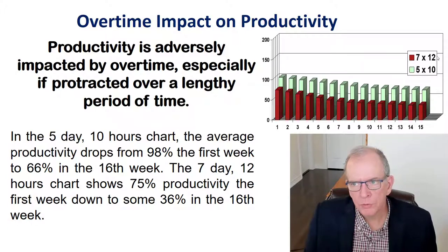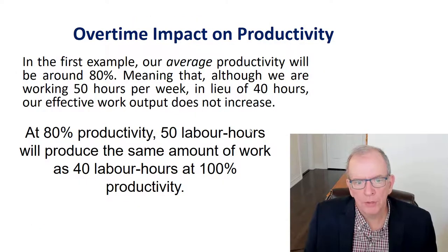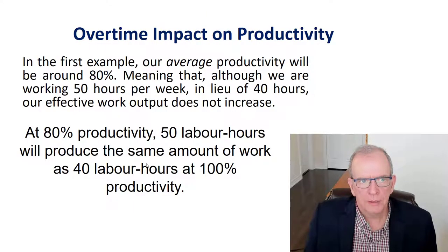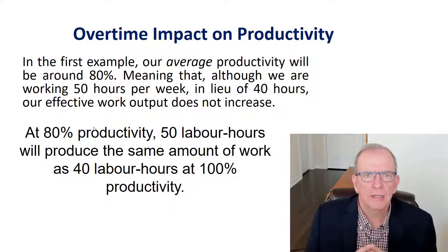Most labor codes wouldn't permit that, but definitely you want to look at that, and you want to be careful about thinking, well, just extra hours is going to resolve the problem. Extra hours may help in the short term, but there is definitely a diminishing return at a certain point where you're actually not gaining that much. So that's to be considered in that process. That's what I wanted to cover in this lecture.